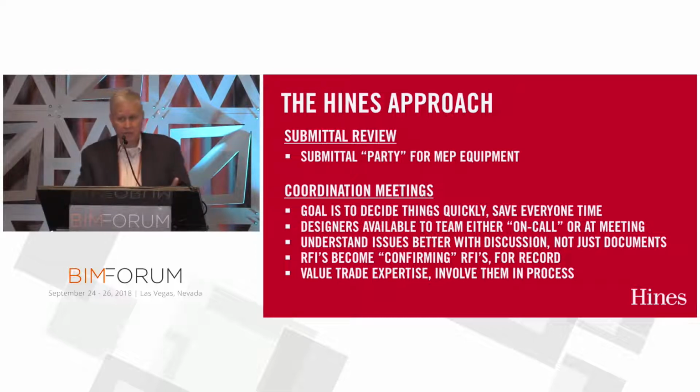We have them on a standing call. They don't have to be dialed into the meeting, but we tell them every Tuesday at 10 o'clock, we need your availability so that if we have a problem, we're going to call you so that you completely understand the issue. Sending RFIs in sometimes just takes so long, and somebody doesn't understand the issue, and it has to go back and forth and have all that kind of time wasted. So we're all about trying to streamline through collaboration.